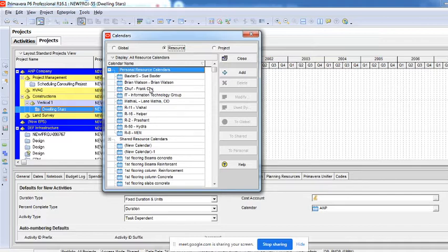So all those particular things can be added into that and can be customized to that particular human resource. But when you create resources like a mason, carpenter, or any unskilled labor, probably when we do not know their individual names, they are not registered employees of your company, so you cannot create a personal calendar for them. So what you can do is share a calendar.